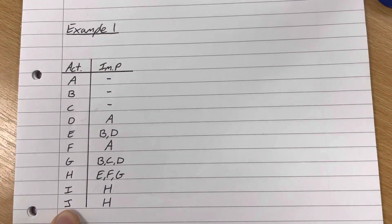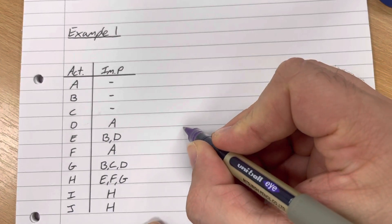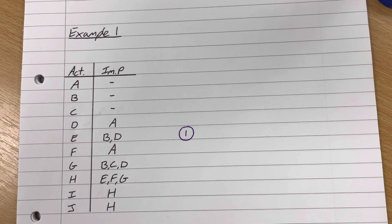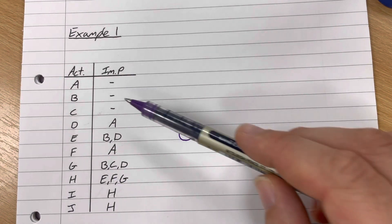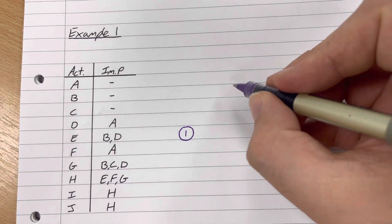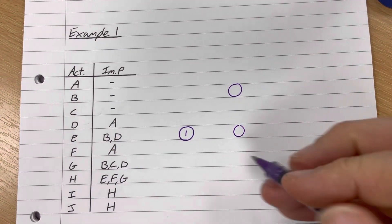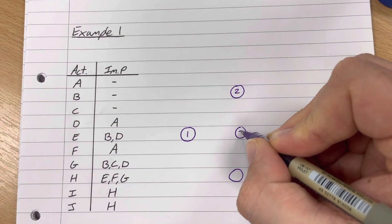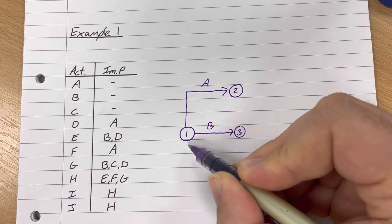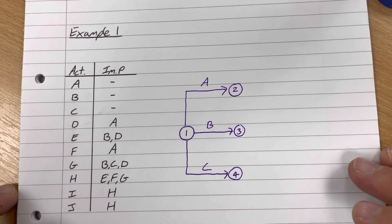These are the activities - we've got 10 different activities in this network, and this represents which activities need to be completed before others can be started. Whenever you start to draw an activity-on-arc network, you're going to start with a node, which is a circle with a number in it - typically starting with number one. Because of the rule that you cannot have two arcs going between any pair of nodes, activity A goes to one node, B to a different node, and C to yet another. So we've got nodes 2, 3, and 4 for activities A, B, and C.